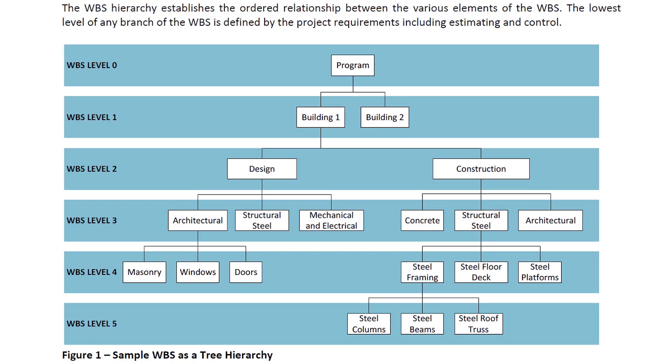Then we come down levels one through five. A really good question as we develop our work breakdown structure for construction projects is how deep do we want to go? There is a possibility of going too deep. Too deep will be too detailed but of course it does depend on the breadth and the scope of your project. I like to go five to six levels deep. If you're doing a major mega build seven is more likely but in my experience I haven't ever seen eight. Doesn't mean it doesn't exist but I haven't seen it. I like to be at level five for a typical one to two year project.